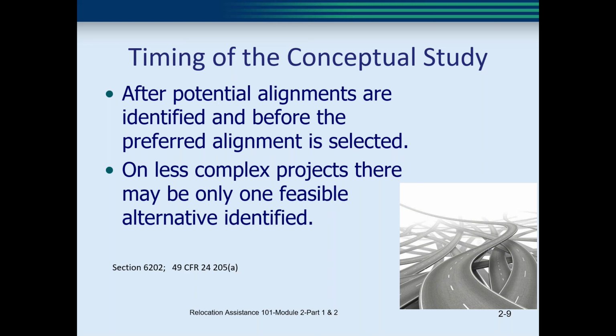So what triggers this report and who asks for it? Your environmental department may ask for this when they are compiling their environmental document. But even if they do not, you still need to be aware that if there is any potential displacement on your project and you have a footprint, it is time for this study.